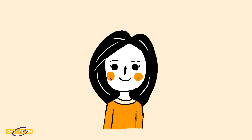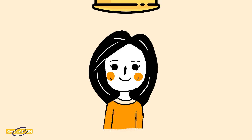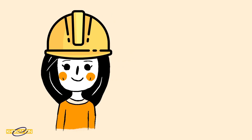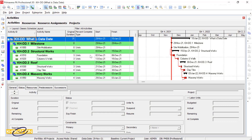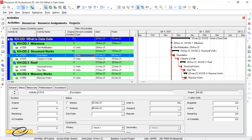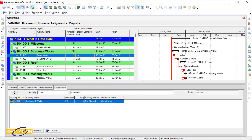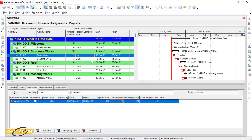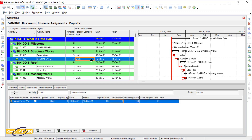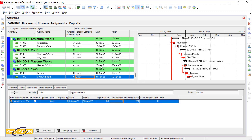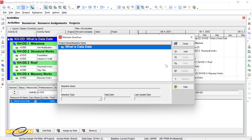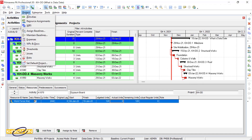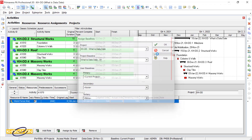You have started your job in a project as a planner. You schedule the project and modify the man-hours for each activity. The scheduled procedure is finished and you get the baseline. It means you have finished the first phase of the scheduling.